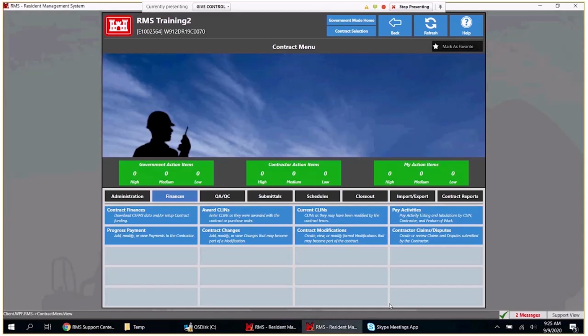So as we all know, part of the process is that throughout construction, you're going to be conducting a schedule meeting with your contractor. You'll do a walkthrough to define progress for the time period, mostly on a monthly basis. Sometimes we don't get pay requests for maybe 3 months, but from the last pay request, you're going to go through progress of each activity.